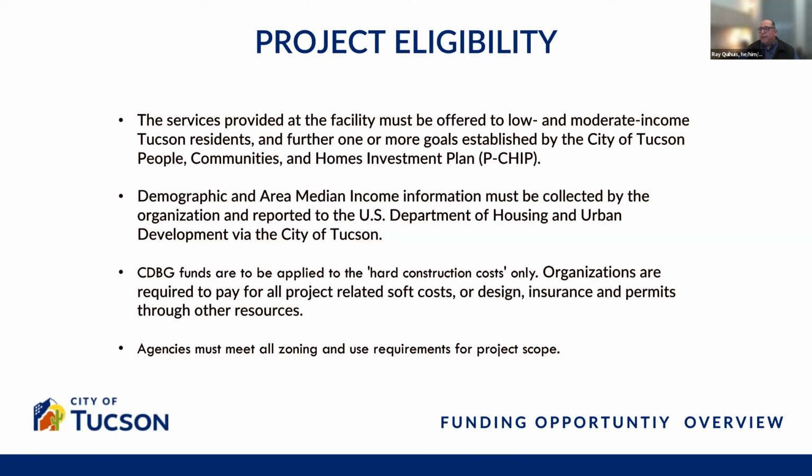CDBG funds are to be applied to hard construction costs only. Organizations are required to pay for all project-related soft costs, design, insurance, and permitting through other sources, not through this source. This is just for hard construction costs. And agencies must meet zoning and use requirements for the project scope. All applicants must meet that.